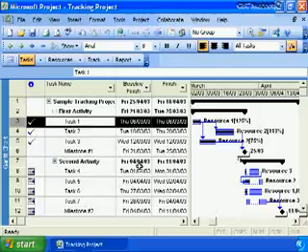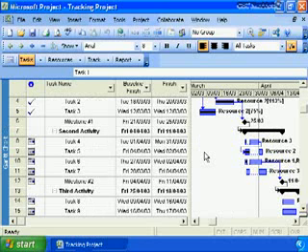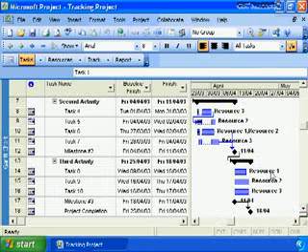You need to manage the data, you need to manage the plan, you need to be as aggressive as possible without introducing too much risk to your project before you go to the project sponsor and say, bad news, the project is delayed. As you saw with a little bit of aggression in Microsoft Project, on this relatively short project, we were able to change our finish date from approximately a week and a half late to now where it is approximately a week early. Yes, by doing these tasks in parallel as opposed to serially, we may have introduced some risk. We may have introduced extra communications channels, but that is a consideration we are willing to manage as the project manager to try to deliver this project on time.